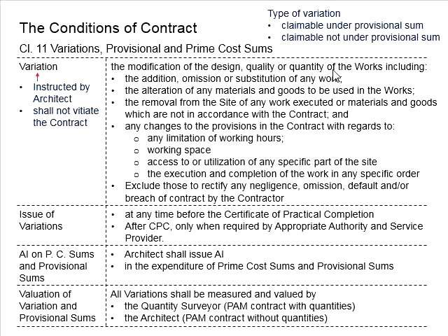The reason being is, before the architect issues the certificate of practical completion, the architect theoretically should have checked through all the relevant work as delivered by the contractor against all the requirements and criteria as stipulated in the contract document. In the case that there are certain parts not fully fulfilled, normally this certificate of practical completion will not be issued. That means it will involve the non-compliance of the contractor. It is only when everything complies and the contractor is clear to go, then the certificate of practical completion will be issued. On this basis, once the contractor has acquired the certificate of practical completion, that means the contractor has already delivered their work as per the contract. Therefore, there is no point to issue for the variations.